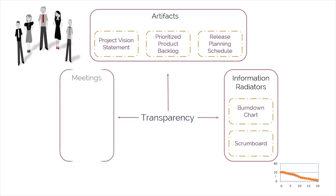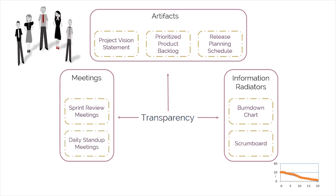Transparency is also supported by daily stand-up meetings conducted during the Conduct Daily Stand-Up Process, in which all team members report what they've done the previous day, what they plan to do today, and any problems preventing them from completing their tasks in the current sprint.